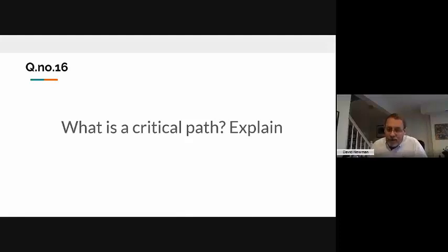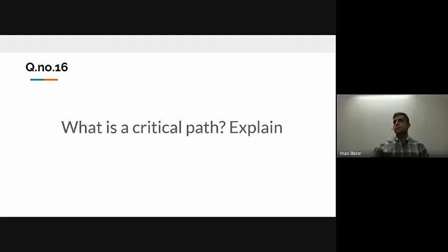Then the next thing I want them to be able to explain is why we don't only focus on the critical path. And of course, the underlying reason for that is because if you focus only on the critical path, the non-critical paths are soon to become critical and bite you. Very good. Thank you, sir.